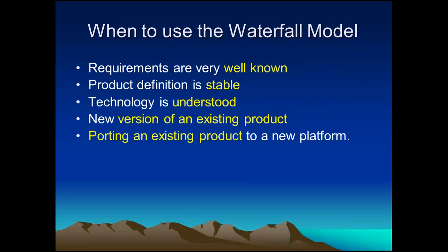It's very simple to say: waterfall model projects are well suited to manufacturing industries, and wherever the requirements are well known, and there is a new version of an existing product, like a change or enhancement in an existing application, or where we are porting an existing product to a new platform. In these situations, the waterfall model is the best model to go ahead with.